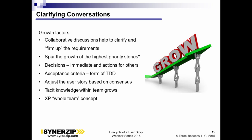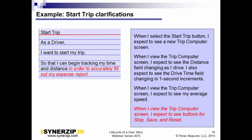Another important growth factor is when the user story receives an estimate. You can use story points — probably the most popular — or t-shirt sizes, hours, or man days. Estimates become really important in sprint planning, helping the team make a good choice for the upcoming sprint. They're also very useful in release planning — helping the team predict what will be in a future release. Agile's ability to measure velocity and use that to accurately predict an upcoming release is a big advantage over waterfall.